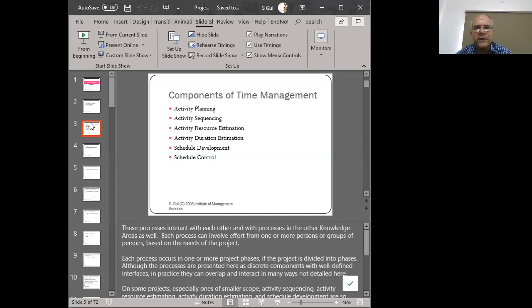So if we want to finish a 40-hour piece of work in 5 days, then we require one person. But if we consider that this 40 hours of work has to be done in, let's suppose, 2 days of time, then one person cannot do this because that person has to do about 20 hours of work in a day.